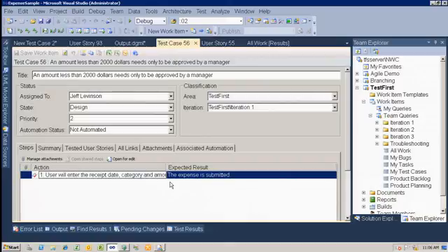So because of this, I've got two options. I can have my tester write them, or I can have my product owner write them. And the only criteria is that I can either pass or fail that particular test case, but there's no detail. Now you want a tester to fill in the detail for you, but anybody can write that test case as long as it's provable and theoretically the business owner signs off on it, that yes, this is what I want it to do. Does that answer the question?